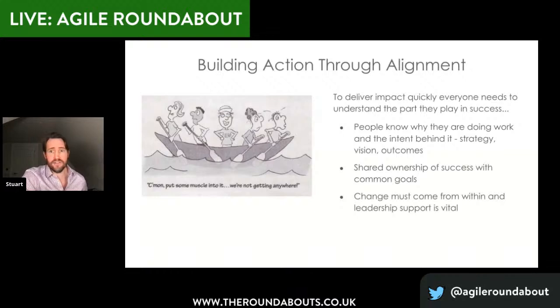So, for example, identifying things early on with longer lead times. I don't know, there must be many people here who have found delivery blocked by not having a contract in place, or with marketing content not being ready yet. We wanted to make sure that those things were identified early, so that there was sufficient time to work with those teams to put all that in place.